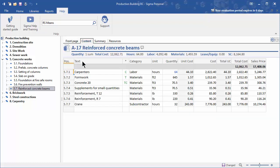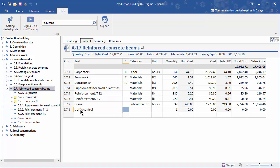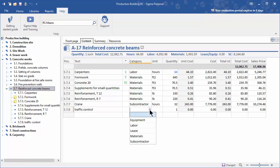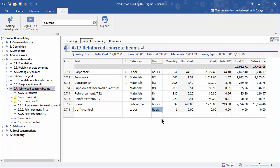In the first available line, enter traffic control. This will be straight labor, so in the category select labor. Select the unit as hours, and the crane is going to be there for 32 hours, so we have 32 hours of traffic control at $44.10.